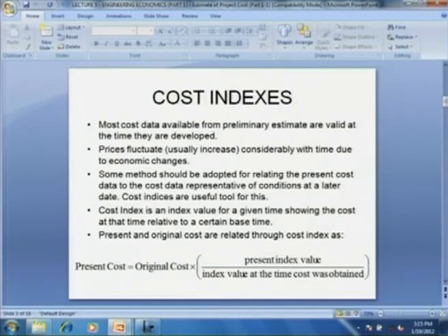What we shall see in this module is for the pre-design estimate. Although we need to understand that the distinction between pre-design and firm estimate gradually disappears as more and more details are included. Pre-design estimate may be used to provide a basis for requesting and obtaining capital appropriation from company management.